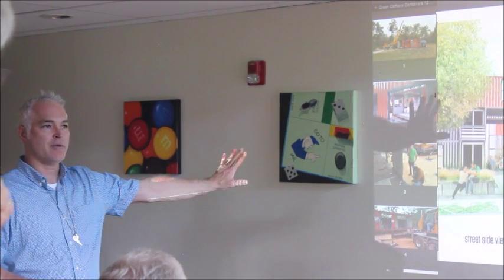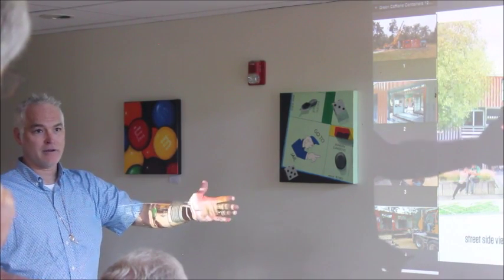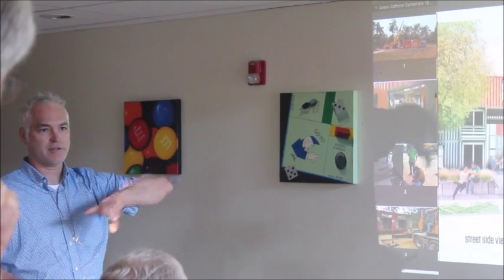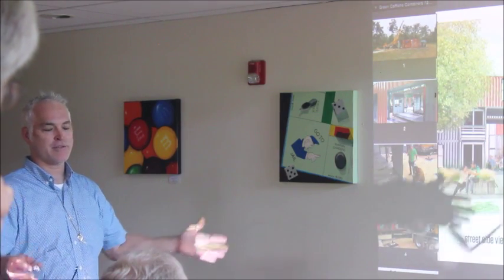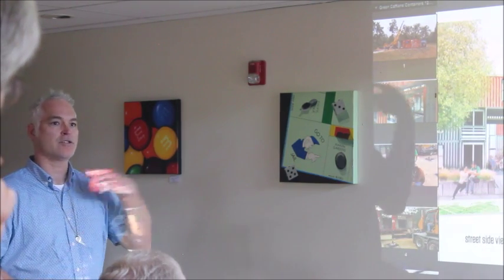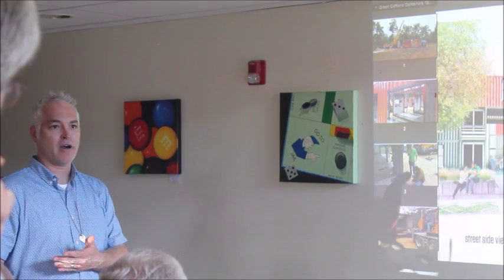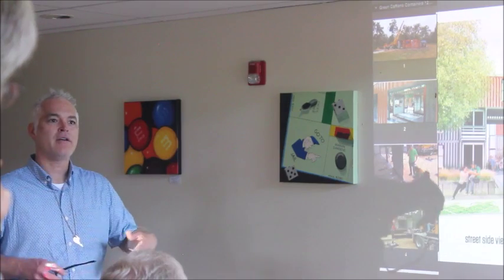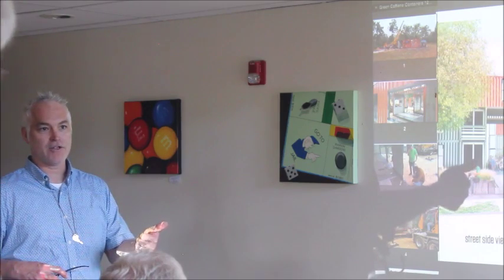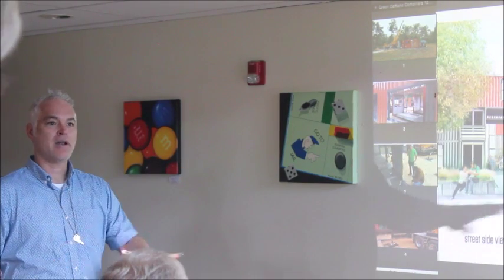The way these are planned to be done, we're securing land next to the port in Port Everglades, literally right there, so we don't have a first transportation cost. The only transportation cost would be from there to the site. And we're setting up a temporary facility with containers and a covering where we can do the modifications. That facility would be temporary, so for the next one we would just move it, maybe Orlando or something like that. We put it where it makes the most sense for making the modifications, staging them, having them ready in batches, and then delivering them, having a smooth operation.